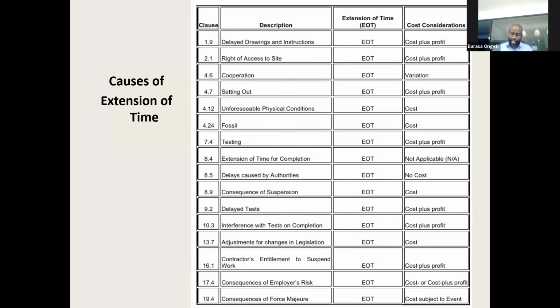If you look at subparagraph 12.3a, it says a new rate or price shall be appropriate if an item of work, then it goes on to list that shopping list. It says A, B, and. So all those must be fulfilled, not just one. That's a catch that many contractors fail to get. But if you fulfill any of them, you can argue your case, though usually it must be "and".